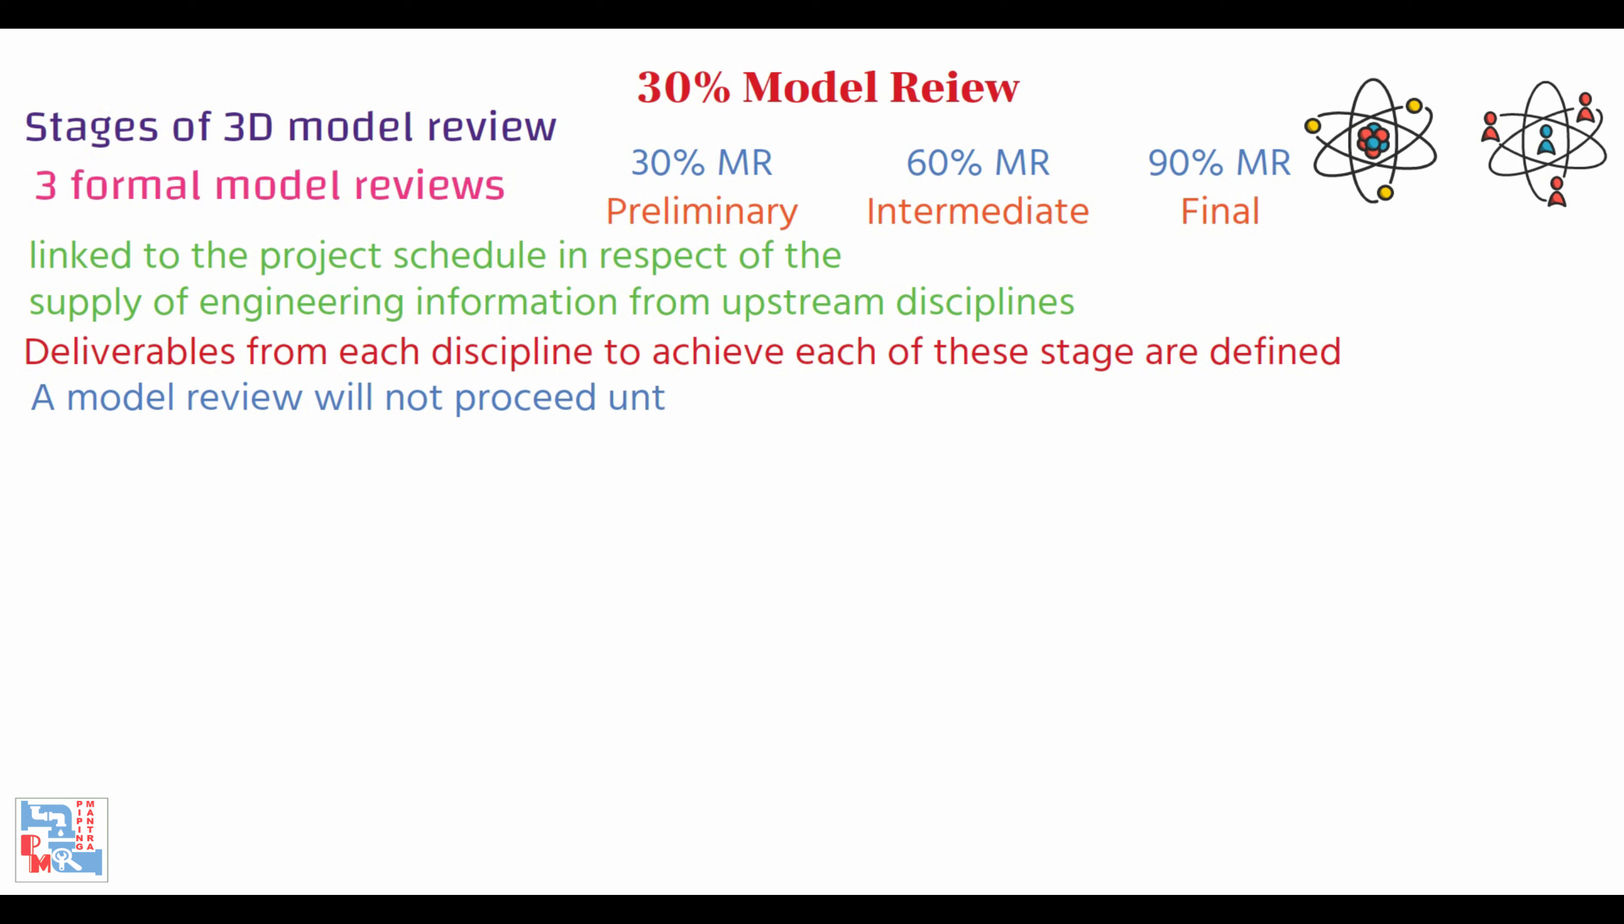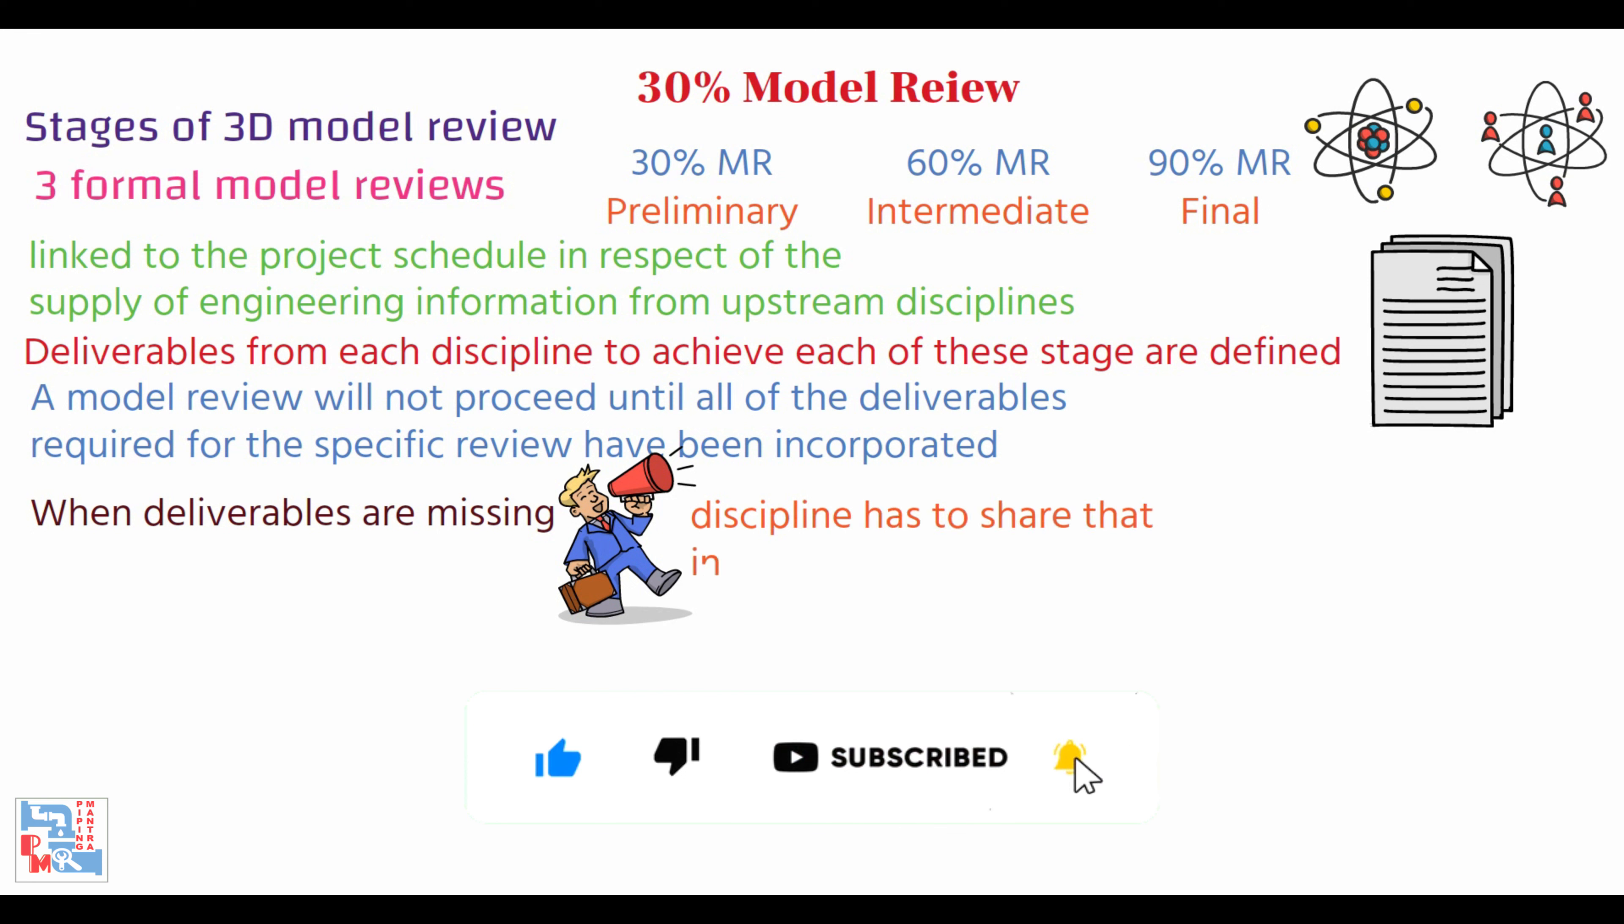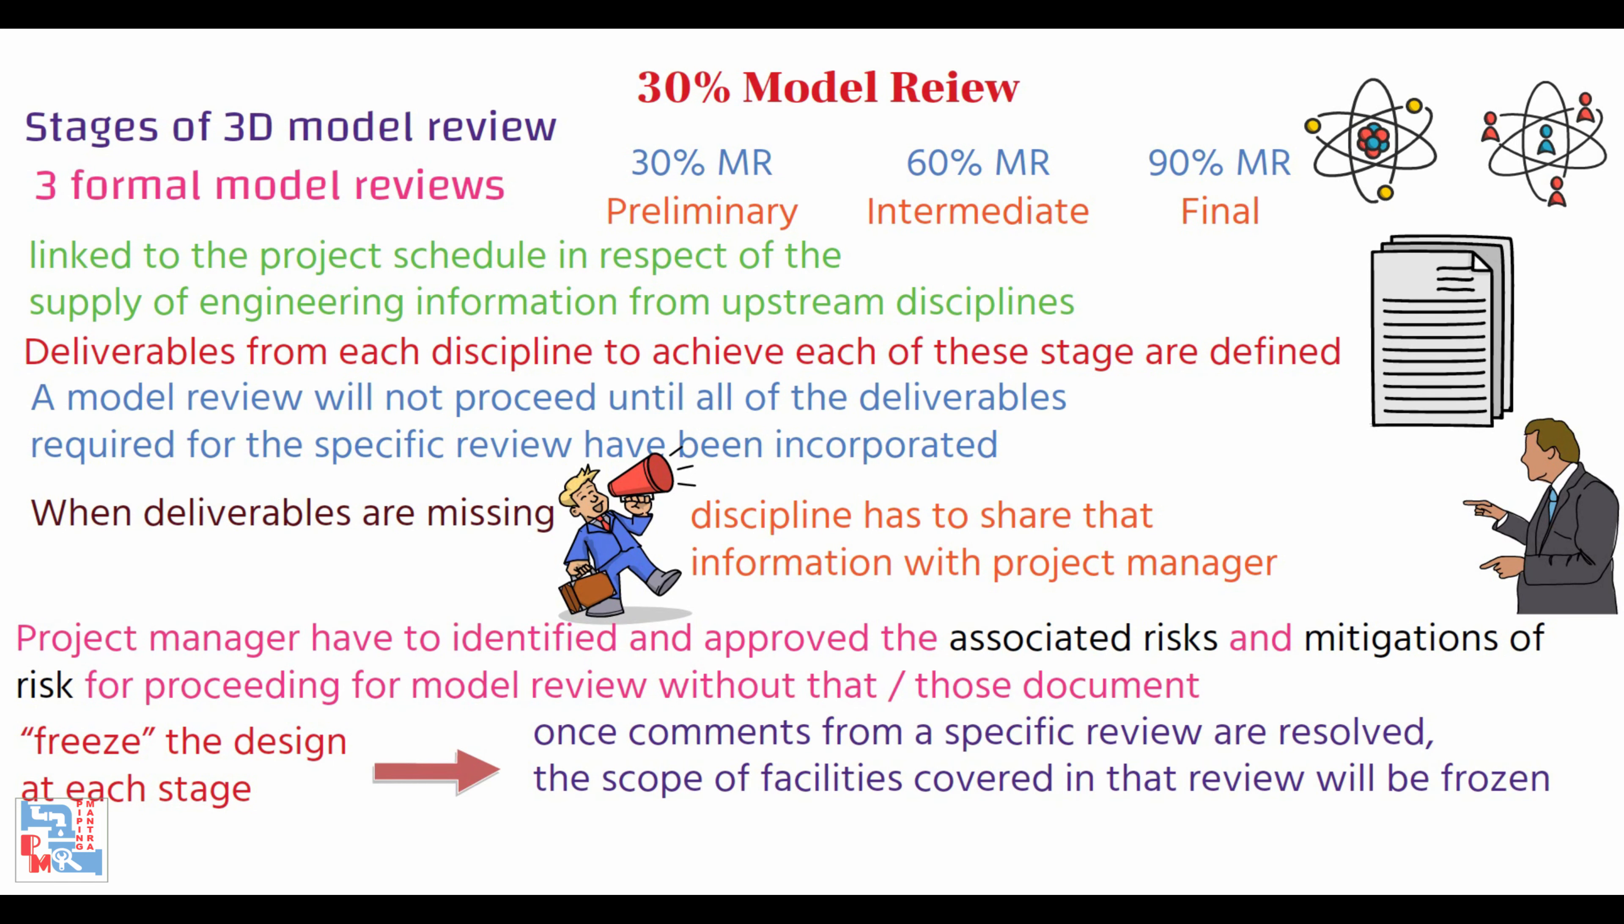Deliverables required from each discipline to achieve each of these stages are defined. Typically, a model review will not proceed until all of the deliverables required for the specific review have been incorporated. When deliverables are missing, a specific discipline has to share that information with the project manager. The model review is to freeze the design at each of these stages—once comments from the specific review are resolved, the scope of facilities covered in that review will be frozen.